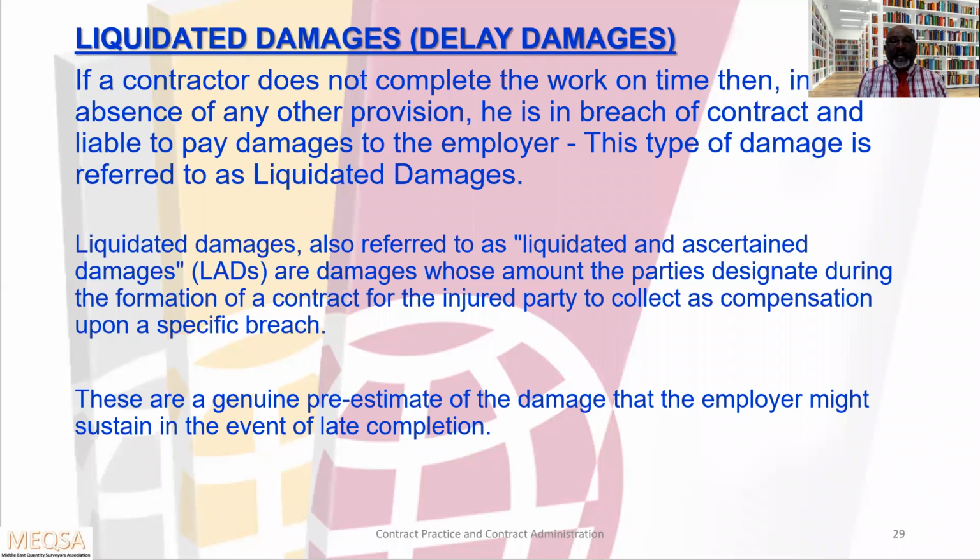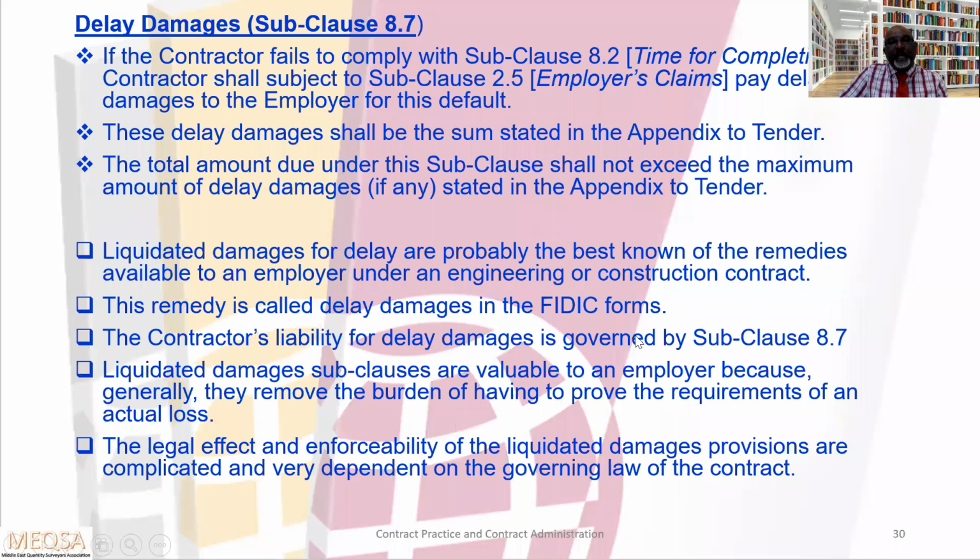Sometimes they might ask, what is your understanding of liquidated damages or delay damages? So you have to say these are a genuine pre-estimate of the damage. As per the Qatar context, this can be challenged. The employer has to prove he has suffered that amount of money. So as per the Qatar Civil Code, this can be challenged. Now let us look at what FIDIC 99 says.